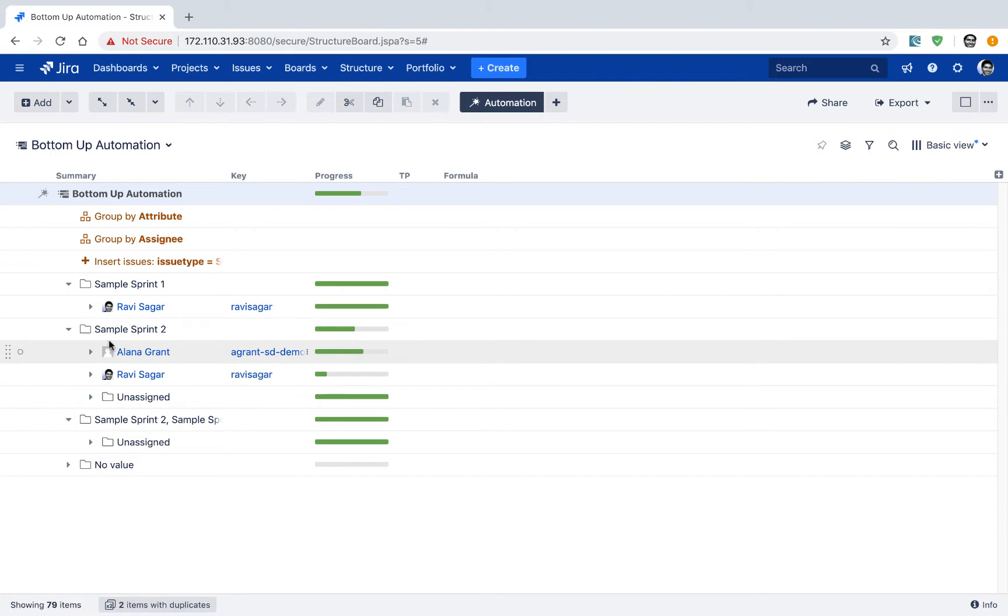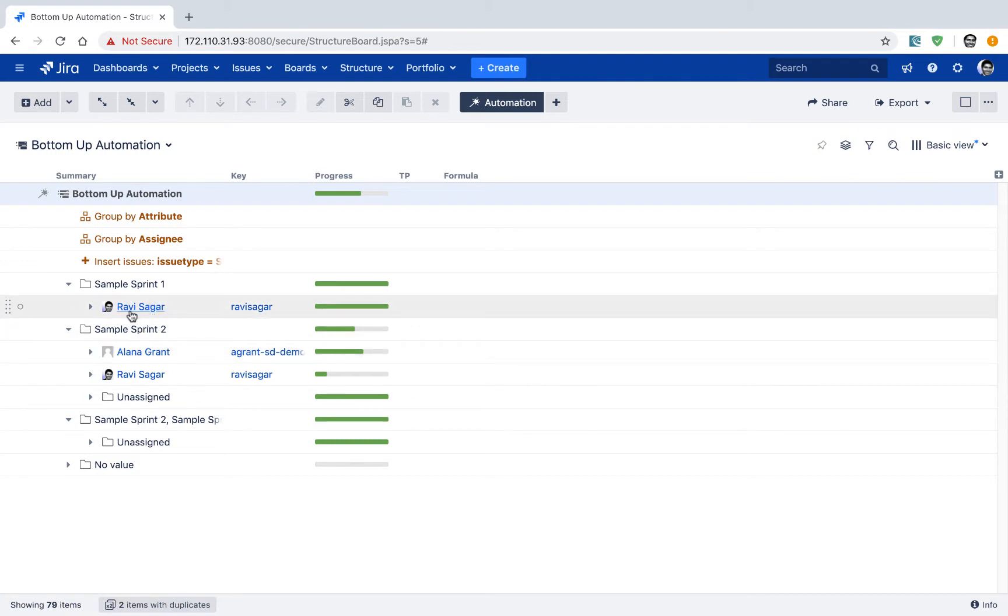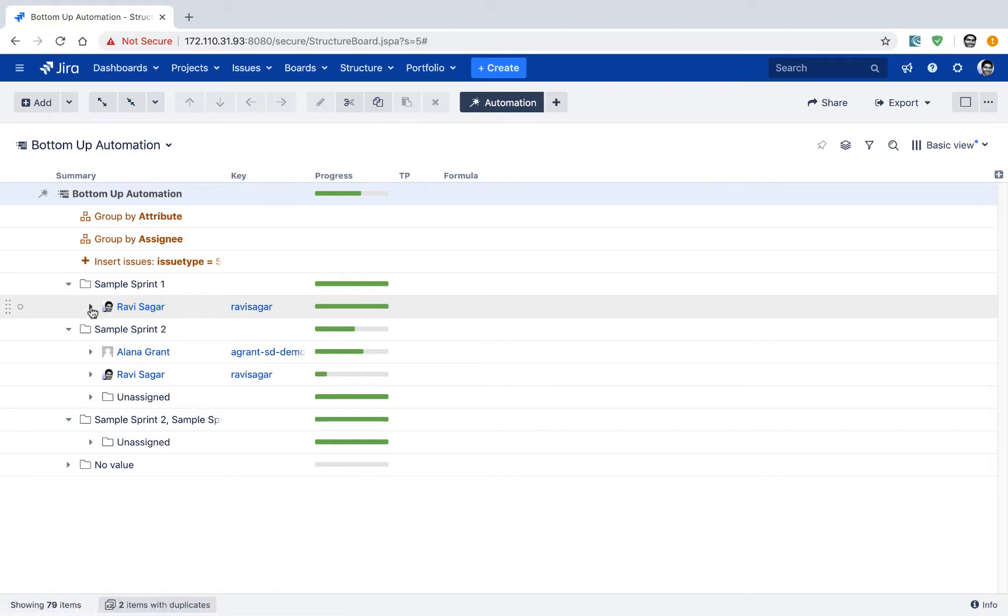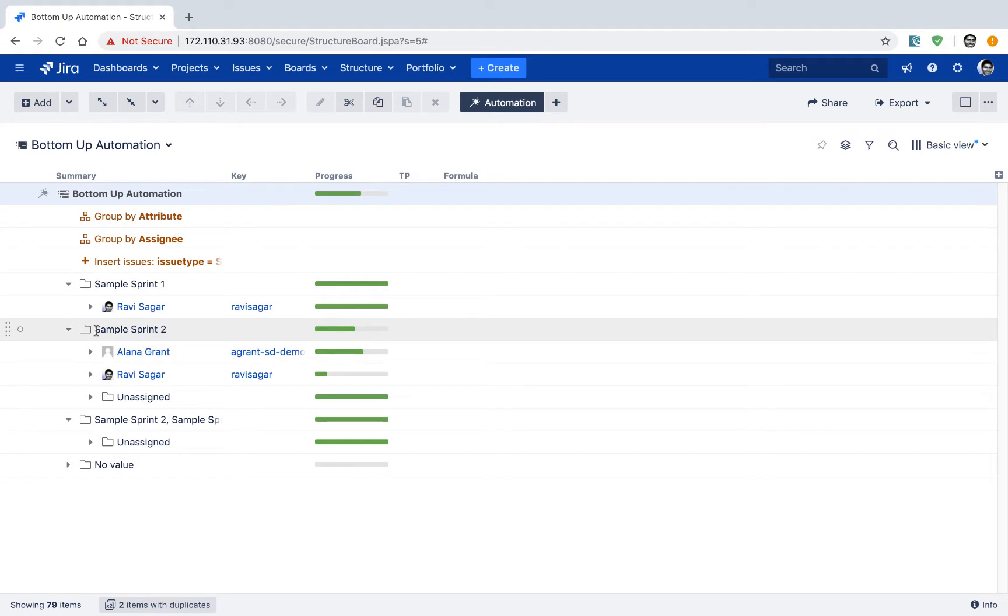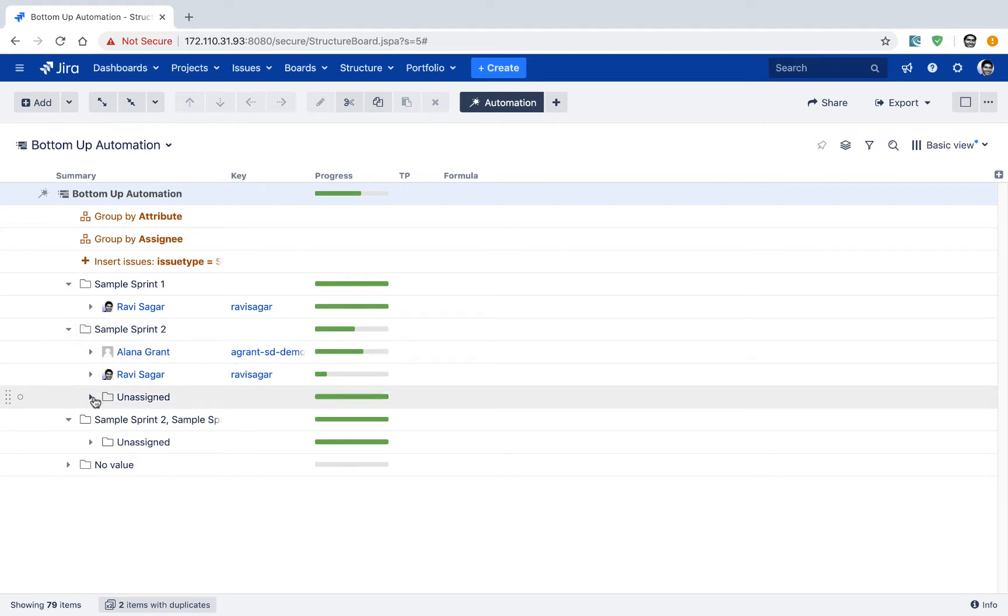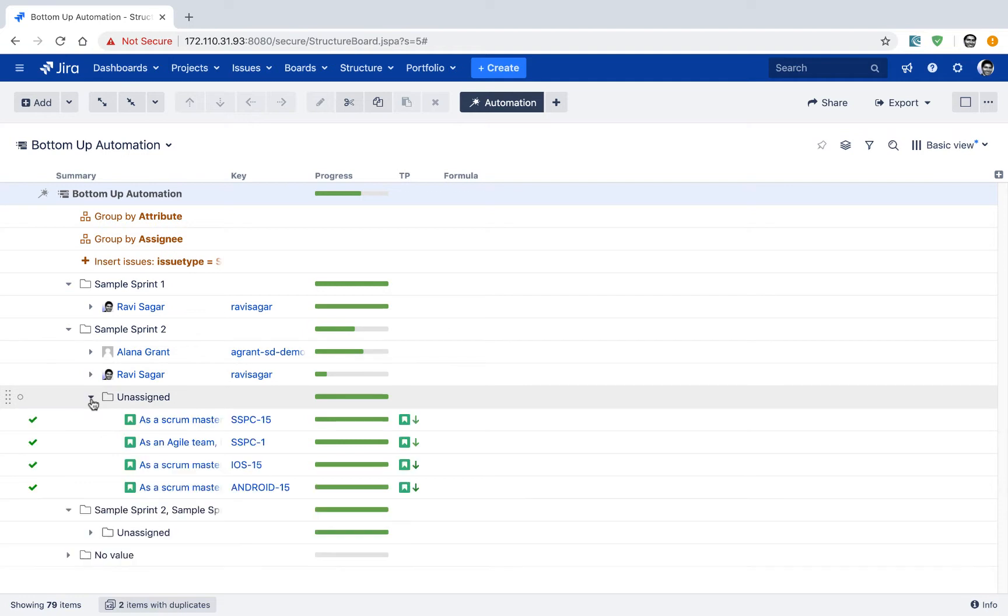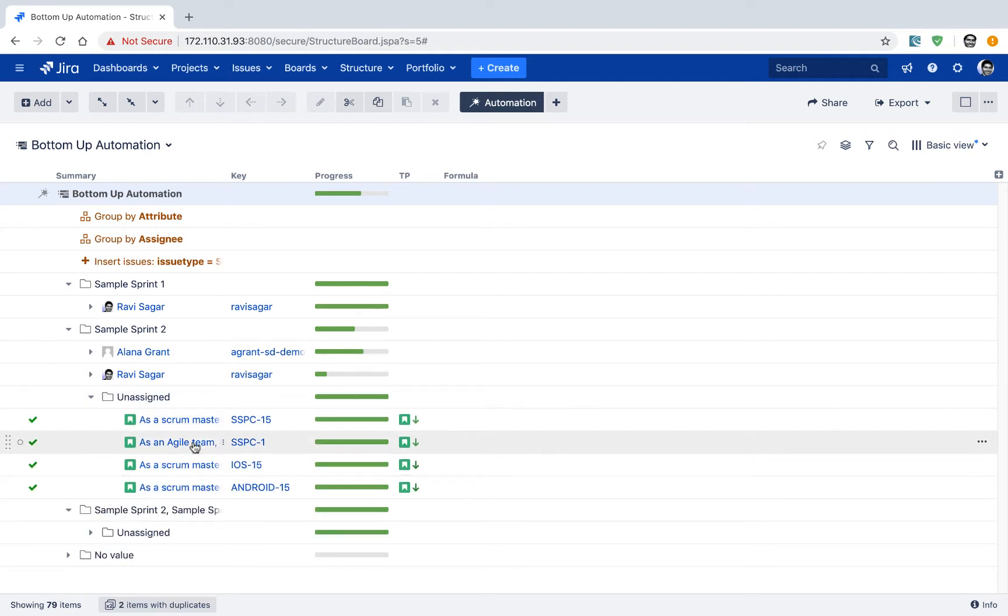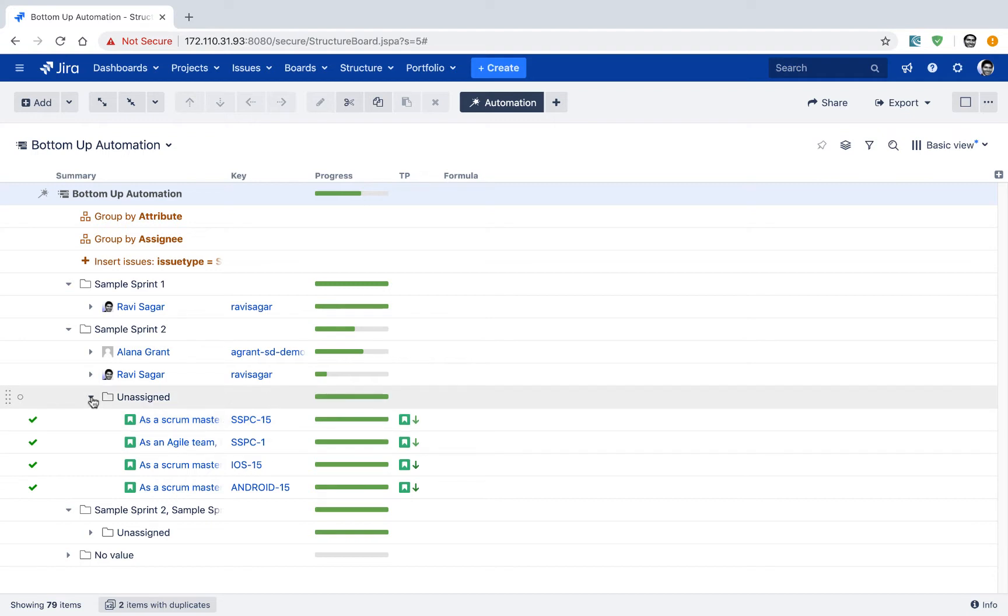For example, I can see here that in my sample sprint one, only one developer or one person is allocated, which is probably not good. On my sample sprint two, I can see here that I have two users, but there are some stories which are not really assigned to anyone. So you can probably assign it to a specific user in your Jira instance. So it's a very nice view.